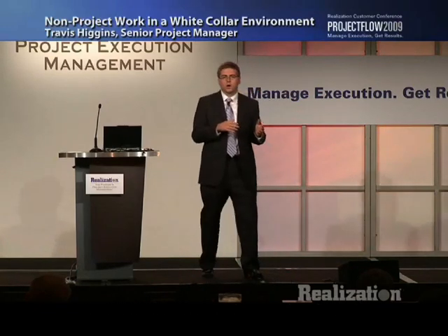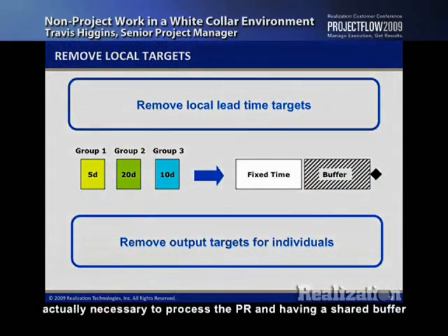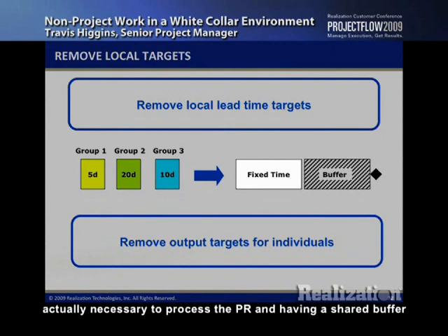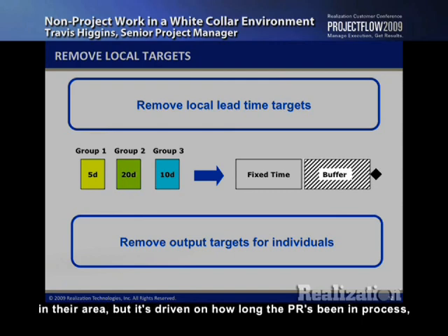So that change, from that, we changed to putting only the fixed time, only what was actually necessary to process the PR, and having a shared buffer for all, so that the urgency wasn't driven on by the individual group's time that it's been processed in their area, but it's driven on how long the PR has been in process and whether we're consuming buffer.